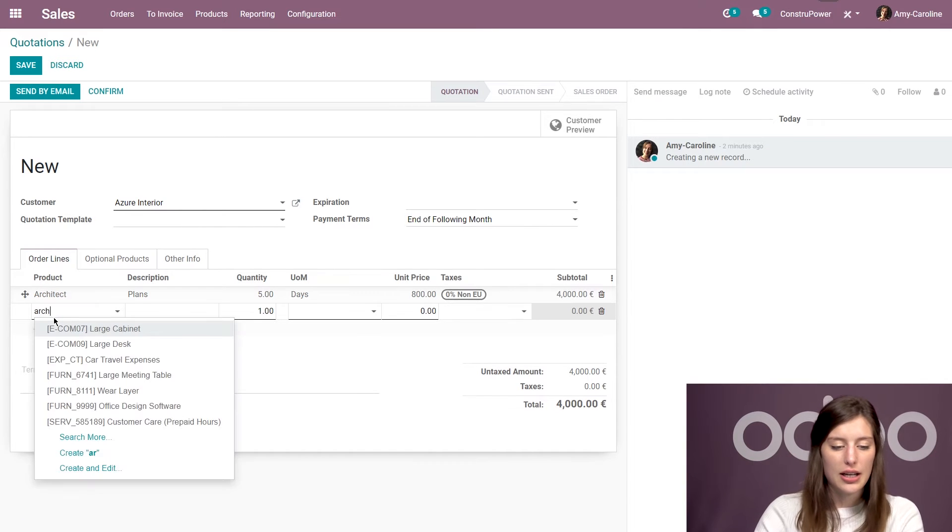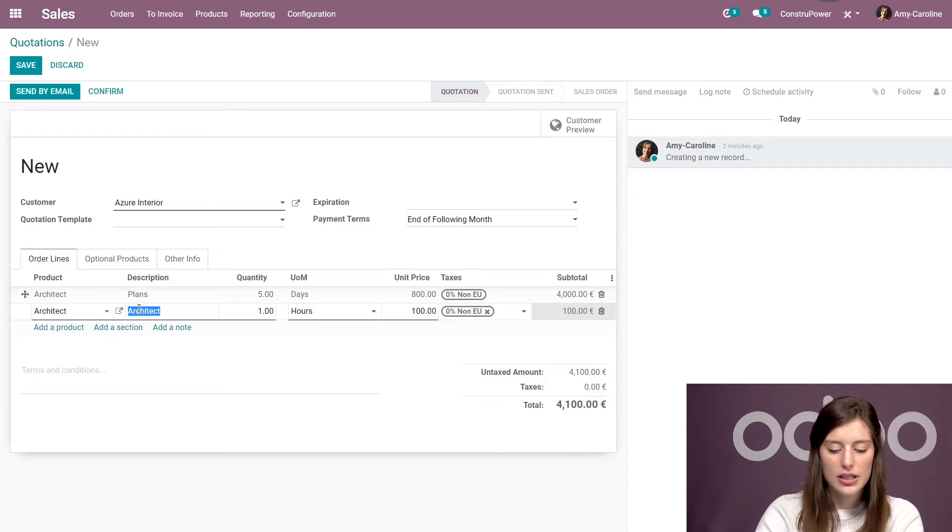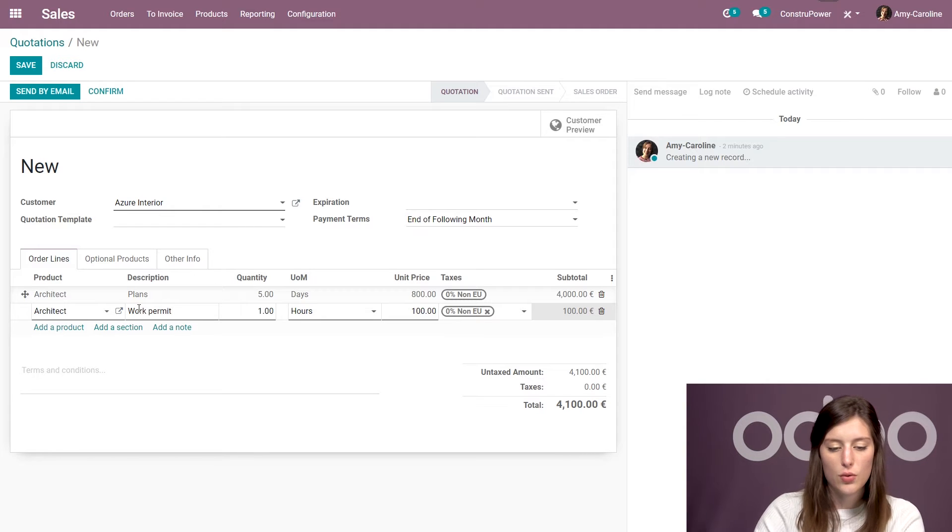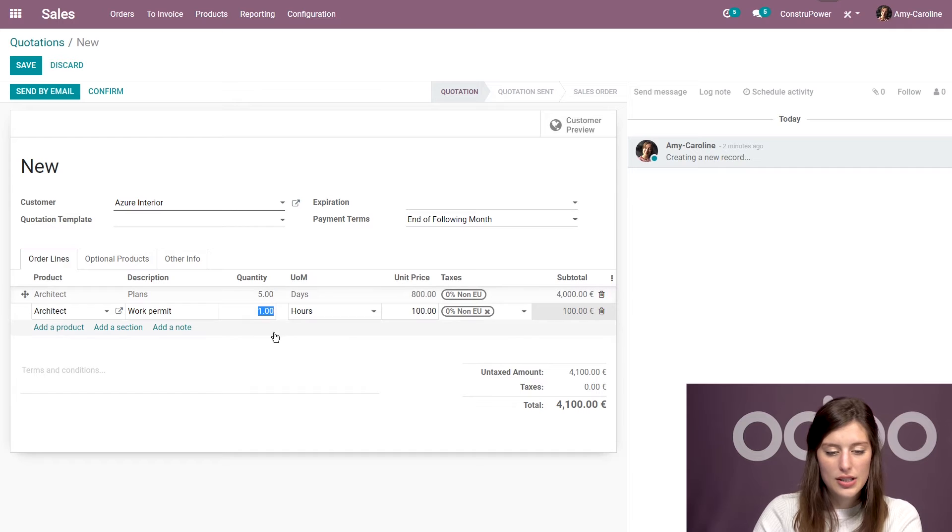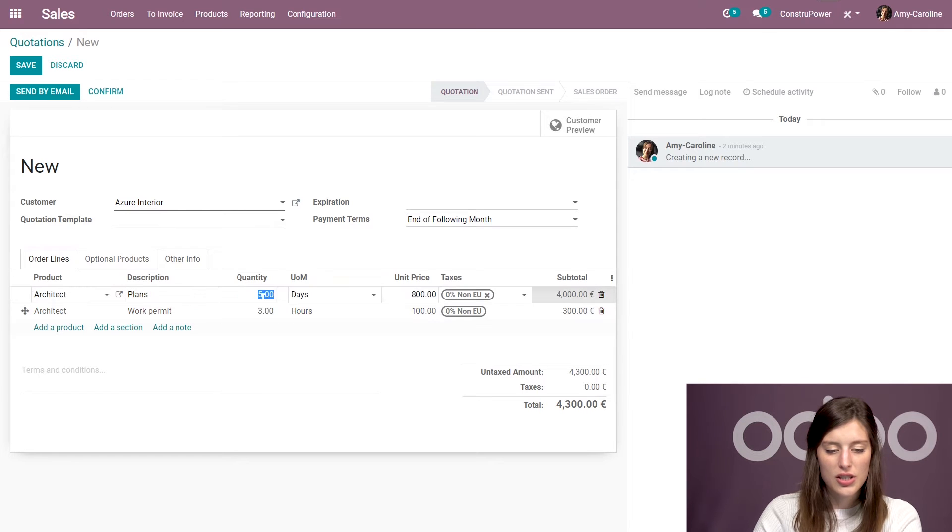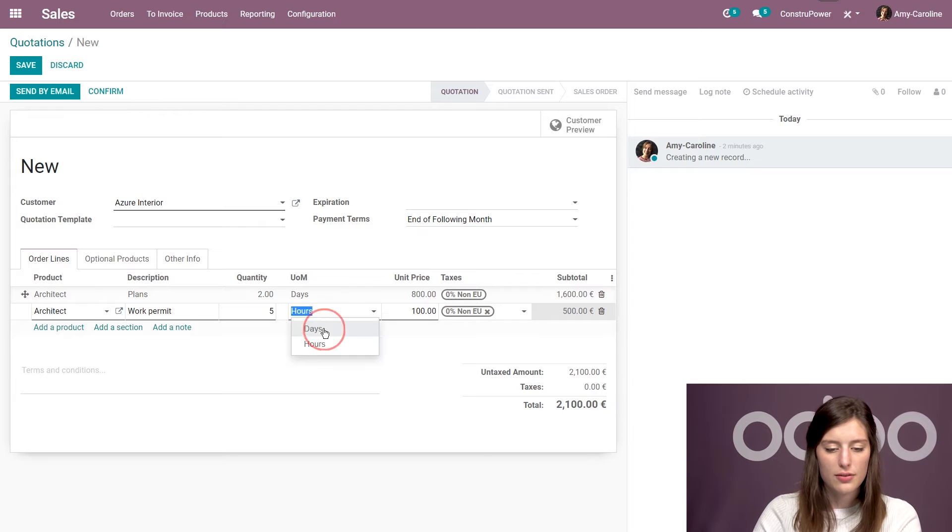I'm going to add some more work for the architect who will do the work permits. Of course, we need the work permit before we can start really working. And that's going to take, let's say, three days. Actually, I'm going to change this. I think the plans will take two days and the work permit will take five.